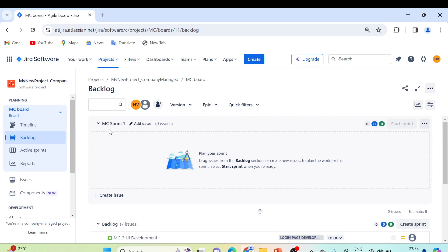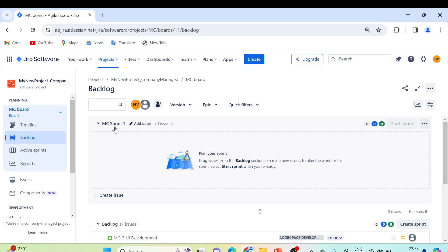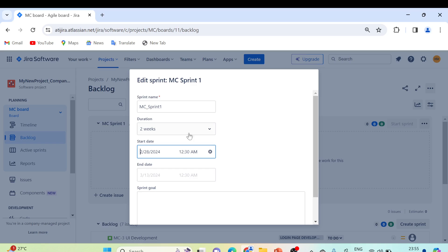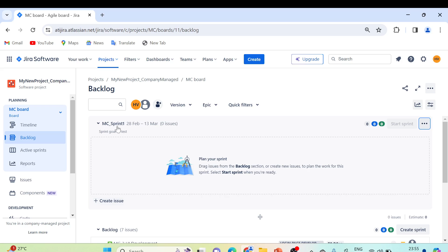In the backlog, all user stories are listed with their associated epics. You can see 'MC Sprint One' — MC is the project key. We can edit the sprint and give it a proper name, like MC_Sprint_One. Set the duration to two weeks, decide the start date and end date, and provide a sprint goal. Then click Update to save the changes.